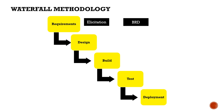Once the BRD is signed off, the next major deliverable is the FRD — Functional Requirement Document. Where the BRD captures 'what,' the FRD captures 'how' — how the system should work. For example, the requirement to add or delete items from the cart (say BR4) might be mapped to FR4a for adding and FR4b for removing.